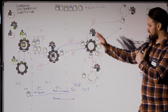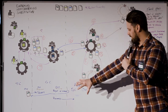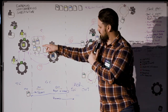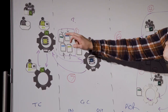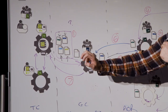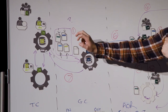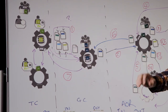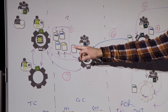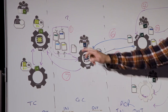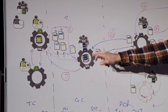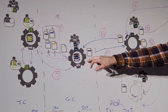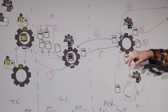If you have one submittal package for a specification section — a data sheet, a shop drawing — for what's called a lighting package, it's turned in on a day with a timestamp to a GC. That GC sends that submittal package over to the architect.